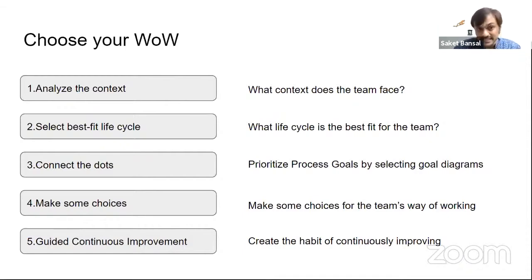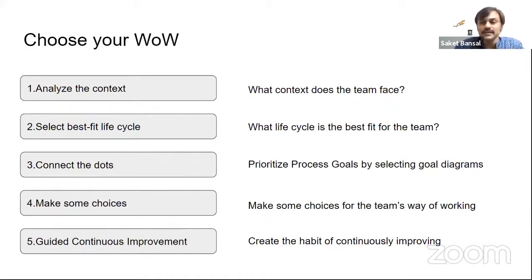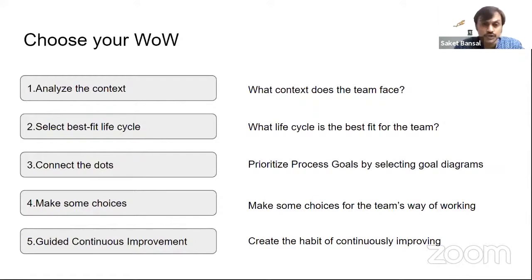So what is the approach which Discipline Agile is talking about? It is telling you that first, before you even pick up a process, don't say we will do Scrum, don't say we will do Kanban, or don't say we will do Waterfall. You need to decide based on your context — look at whether you have a dynamic requirement or a stable requirement. There are parameters you can use to understand what problem you are solving and in which area you are operating.